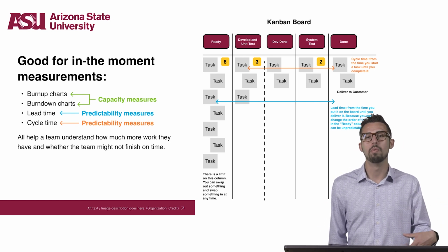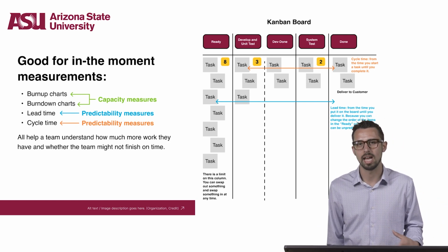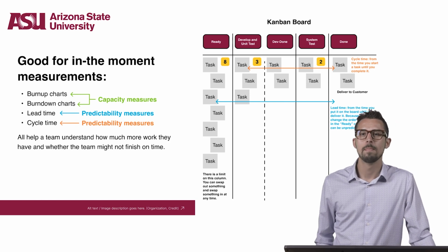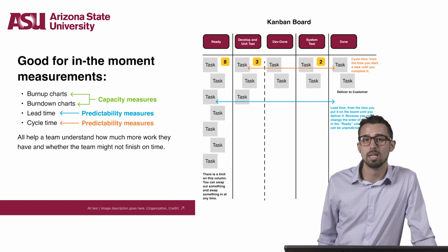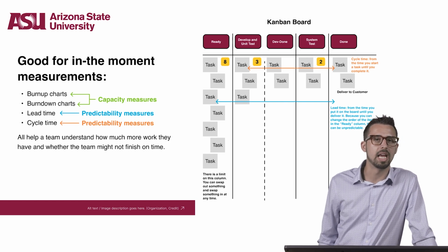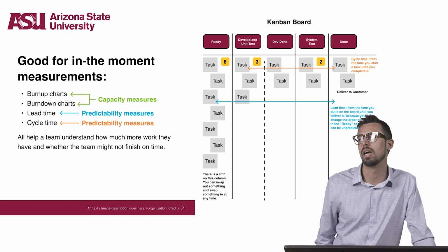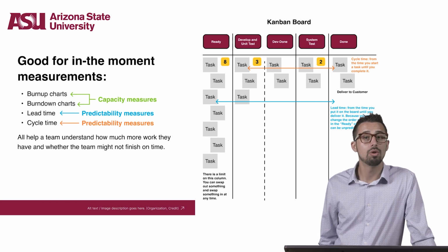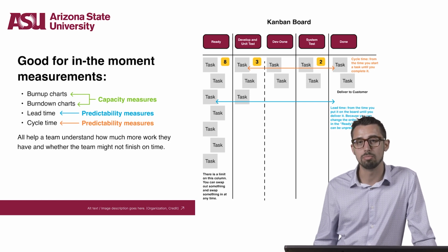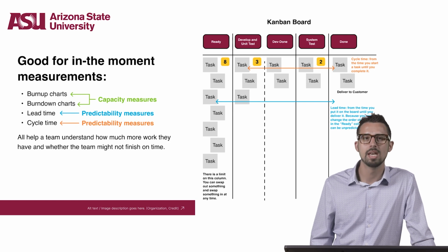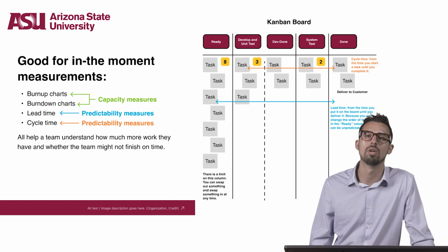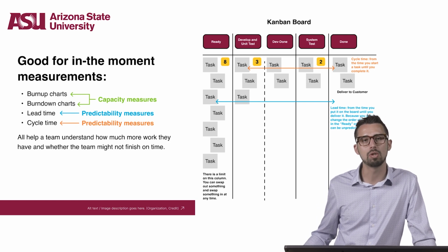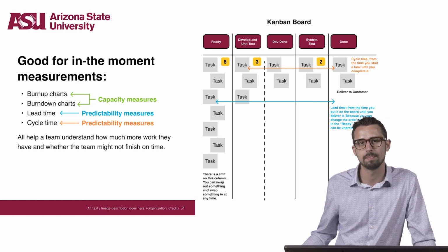For example, when teams depend on external people or groups, you can measure the project's cycle time to see how long it takes for the team to complete that work. You can also measure the project's lead time to see the factors, tasks, or stakeholders outside the team's direct control that influence the completion or progress of their work.